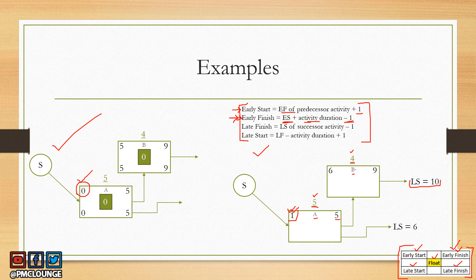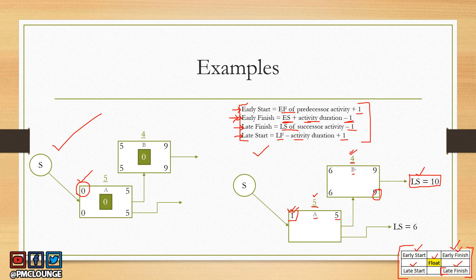For the backward pass, we need the late start of the successor activity, which is ten. To calculate late finish for activity B, we use: late finish = late start of successor − 1 = ten minus one = nine. To calculate late start for activity B, we use: late start = late finish − duration + 1 = nine minus four plus one = six. So the late start for activity B is six.